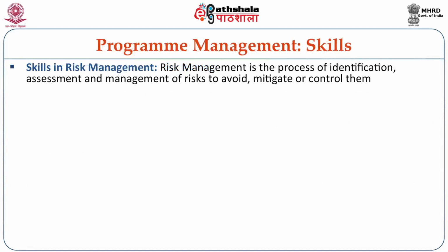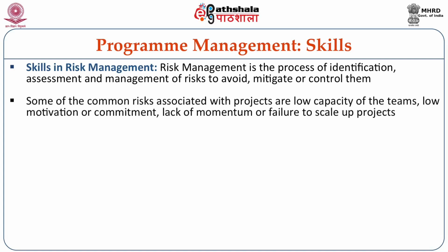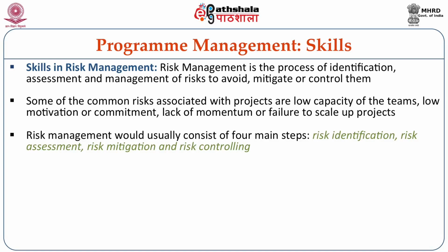As we said, you have to look at risk management, because risks are inherent, and many times risks do come in. So risk management is the process of identification, assessment and management of risks to avoid, mitigate and control them. Some of the common risks associated with projects are low capacity of the teams, low motivation or commitment, lack of momentum or failure to scale up the project. Risk management usually consists of four main steps: risk identification, risk assessment, risk mitigation and risk controlling.